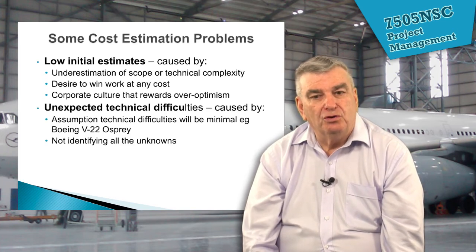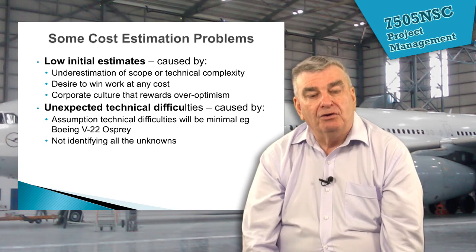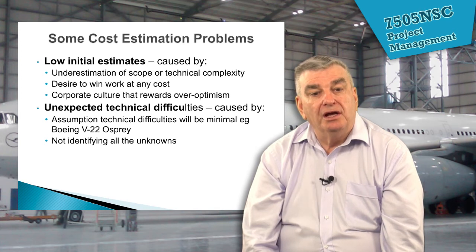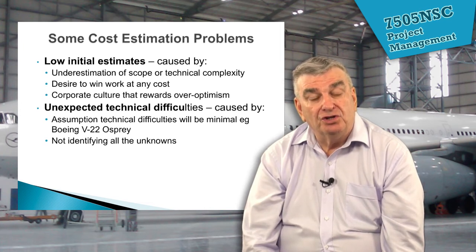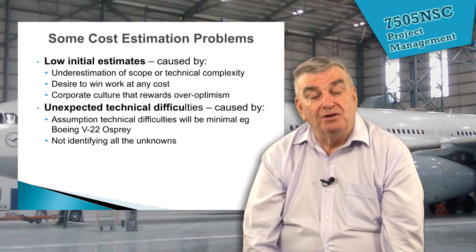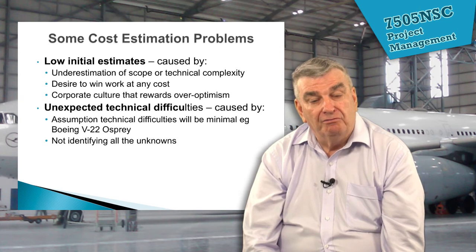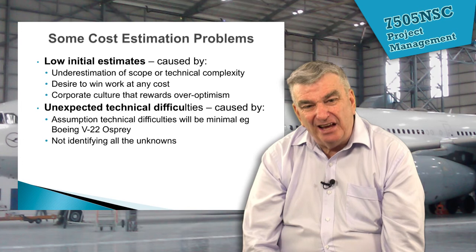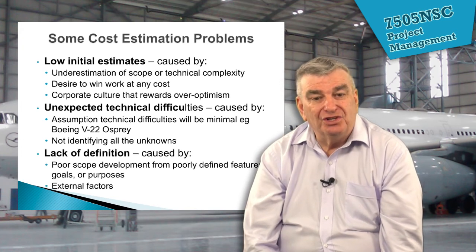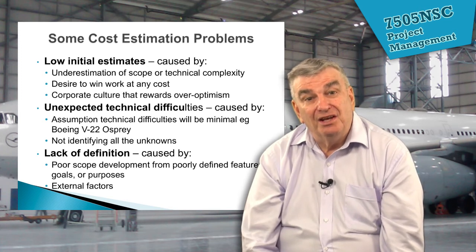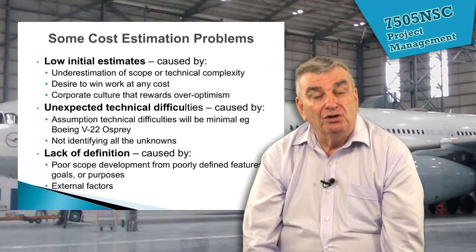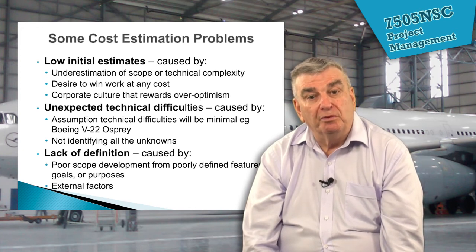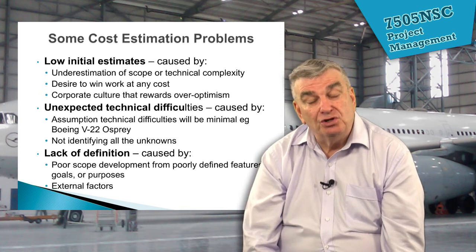There are unexpected technical difficulties. A good example is the Boeing V-22 Osprey aircraft — a vertical take-off and landing aircraft that can rotate the engines and fly at high speed in level flight. Boeing, who developed this in conjunction with other companies, found problems they hadn't expected, especially in tilting the engines, and had a very terrible accident simply because they hadn't realised just how complex it would be. Then there's a lack of definition — the customer doesn't understand the actual work they want done, and combined with that, the contractor may not have done it before. Both are on a learning curve.